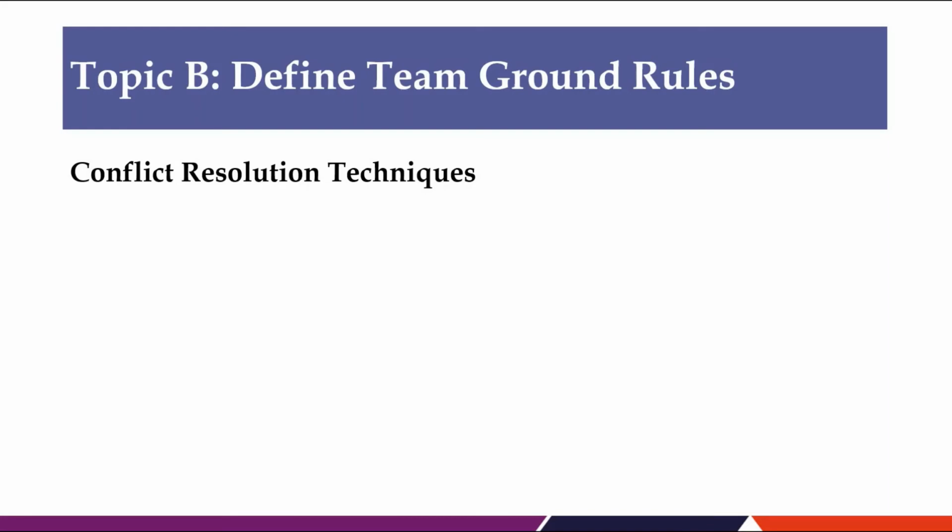The following conflict resolution techniques could be followed by the project managers. Collaborating or problem solving. With this technique, the parties openly discuss differences and try to incorporate multiple viewpoints to arrive at a consensus. Collaboration leads to a win-win situation.